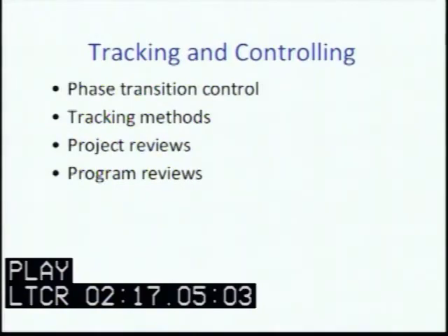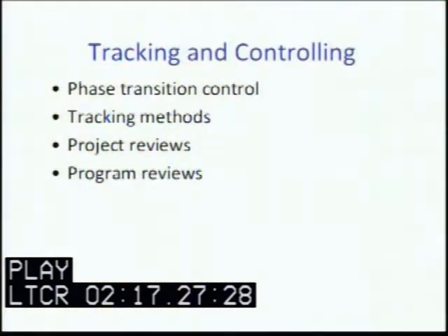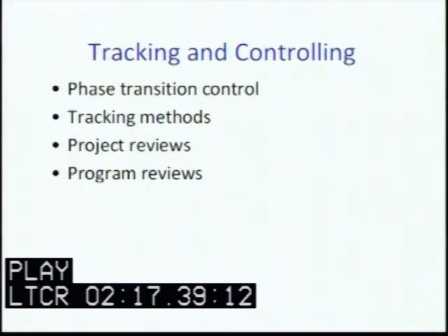There's a number of different methods to do that, but a couple of common methods include project reviews on an ongoing basis. Typically at the end, almost certainly should be done at the end, we review our project. When we transition between stages is a good time as well. If our project is part of an overall program, recall that that is a set of related projects. A stage transition or a phase transition is a good time to do an overall program review and to look at how our projects are interrelating to each other and helping each of them achieve their own project goals.